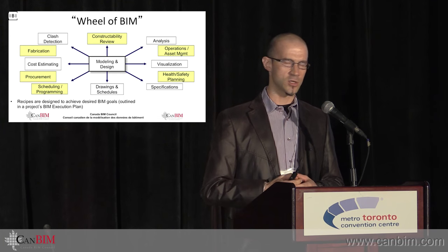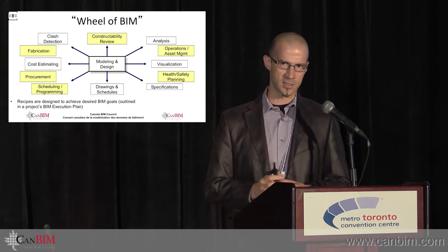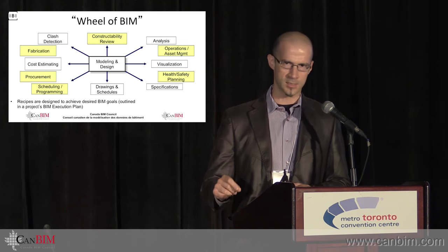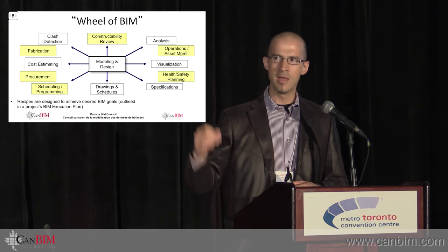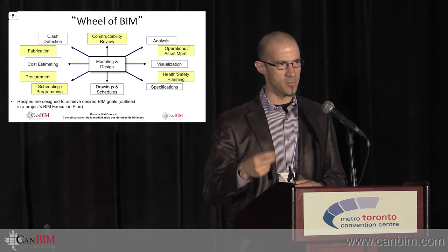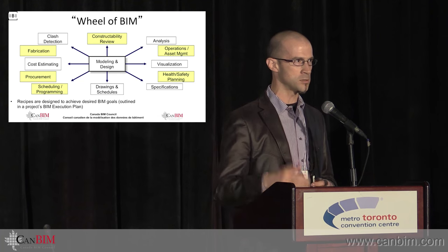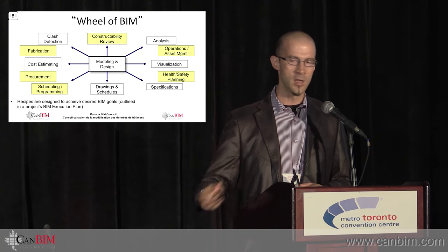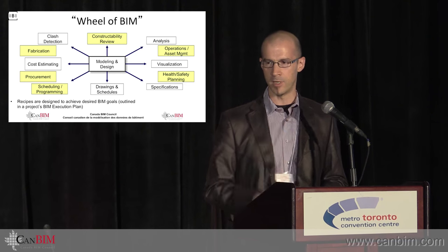Just want to quickly touch on cost estimating, because I just came from the cost estimating one. BIM doesn't do your cost estimate, and that's something I say all the time. I list it as cost estimating because that's the general perception, but BIM can give you quantities or content to support cost estimating. Same way BIM won't design my building for me.